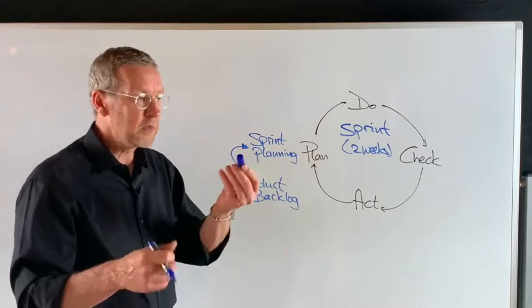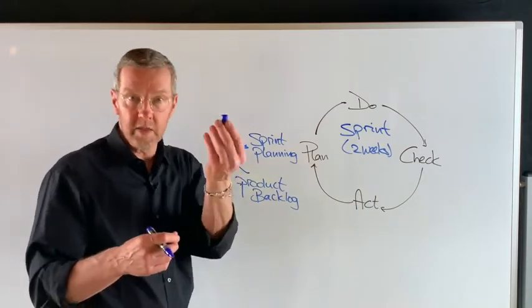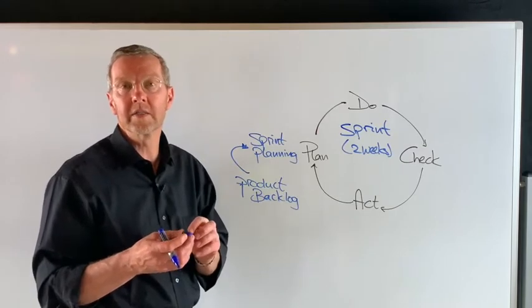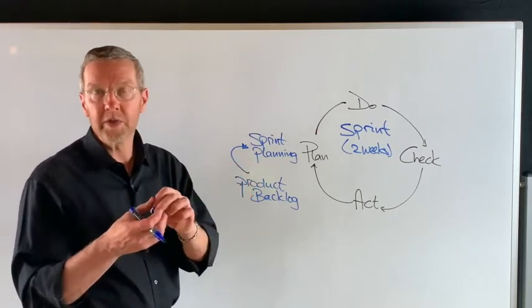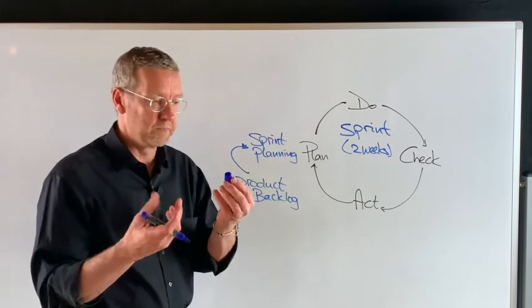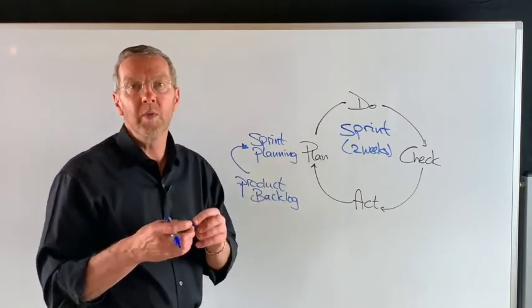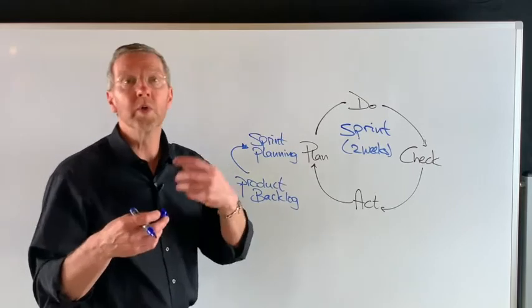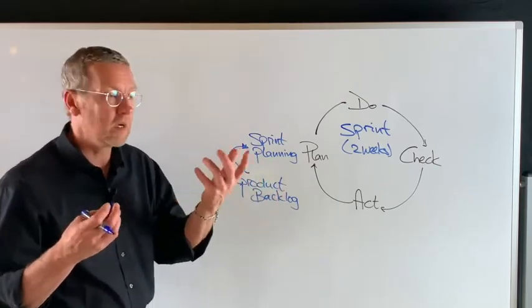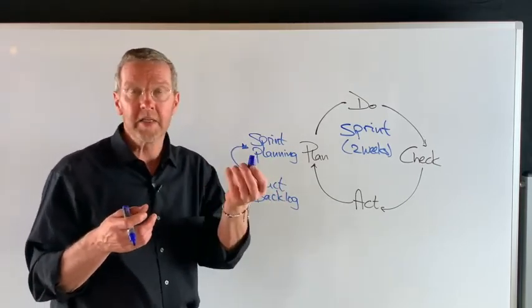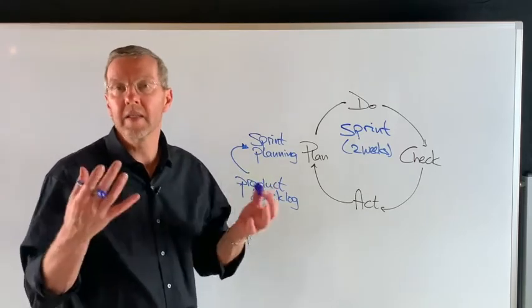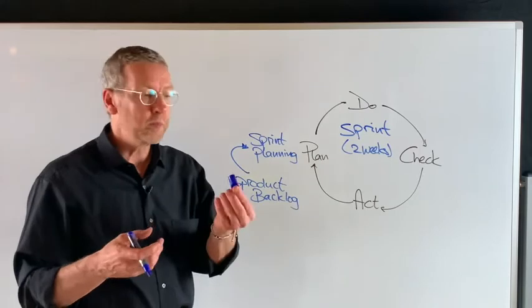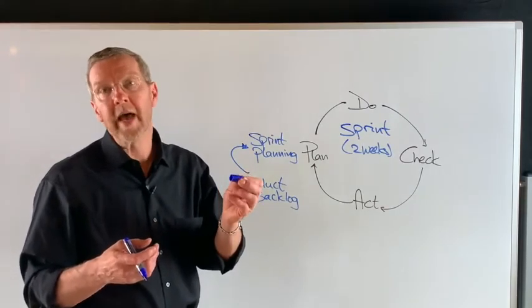So if producing the cap is selected as, we're going to do this in the next sprint, then the work to do the CAD design, the work to 3D print it, work to do the quality inspection, work to check in with supply chain that plastics are available, writing manufacturing steps, everything to basically make it a real cap.